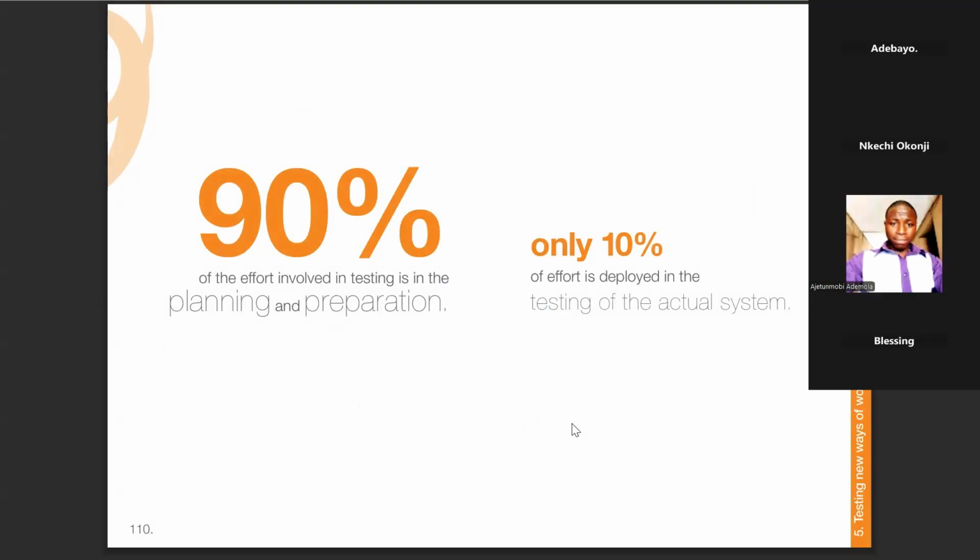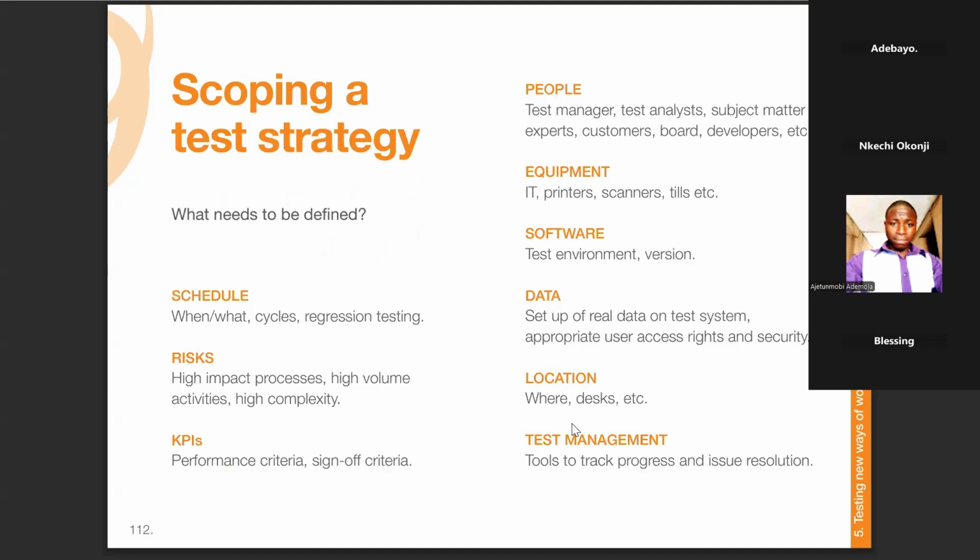Actually, 90% of the effort involved in testing is planning and preparation, because you have to plan the stakeholders, plan the test cases, and the data that will even be used in testing the system. You have to plan them and everything. The actual testing might not take you more than one or two days, depending on the complexity of the full application, right? And if the application is working flawlessly and you are not having service failure, only 10% of effort is deployed towards the actual testing.